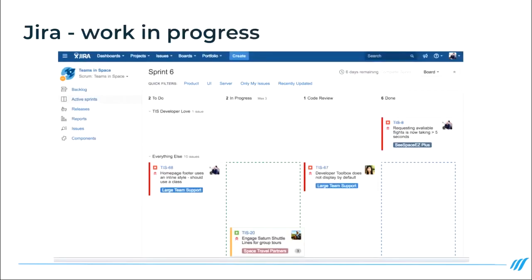Jira also is responsible for showing us the workflow, using tools such as the Kanban board here, or the Scrum board. This highlights work, who is owning it at any particular time, and where it is in the process. It's very easy to spot bottlenecks from this view as well. If there are multiple items in any of the columns, that's likely to be a bottleneck. And you can actually configure Jira to stop bottlenecks building up by controlling the work in progress limit, which is a standard feature of most Kanban boards.